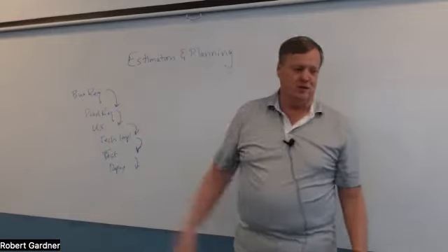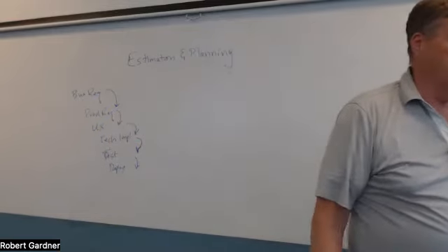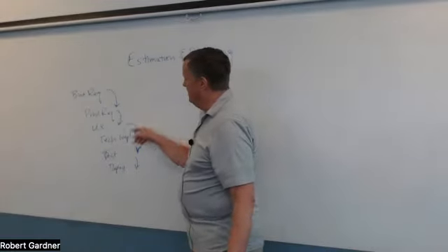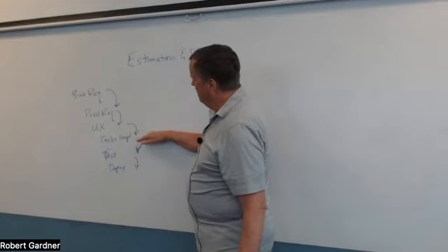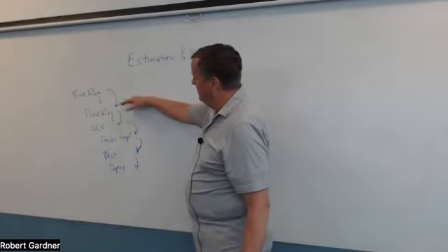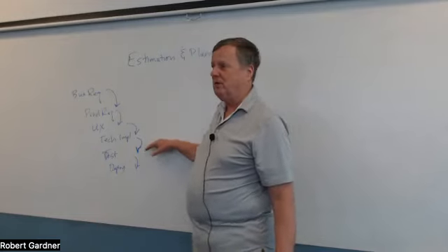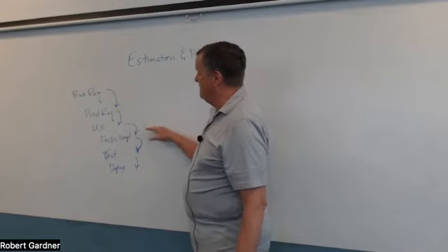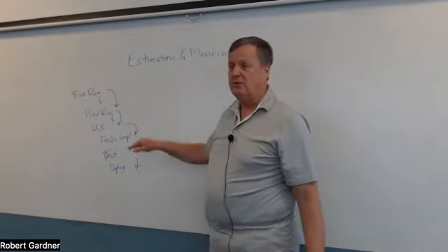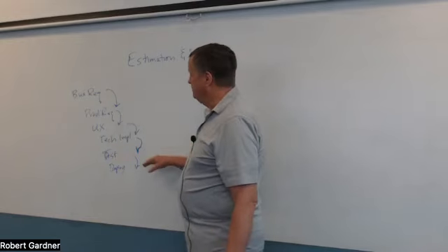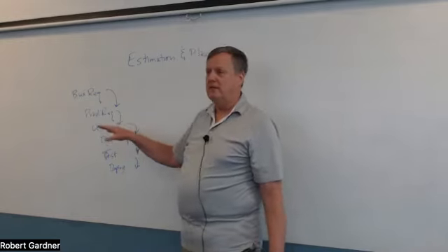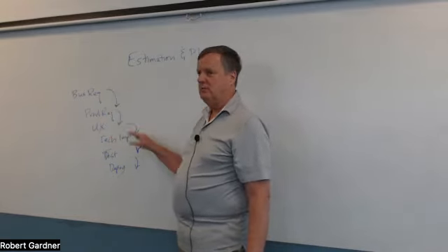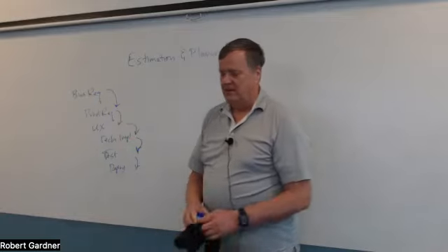So this has historically shown to have a lot of problems in the software development world. It's too rigid, it's too hard to cycle and iterate. You'll get down here and you'll find out there are problems in the product requirements that you can't implement properly, or things take longer than you expected. It was very common for these types of projects from start to finish to be 1 to 3 years in length. And they were almost always late, often about double the amount of time that was originally estimated when they'd finally get finished. And so it was really tough.